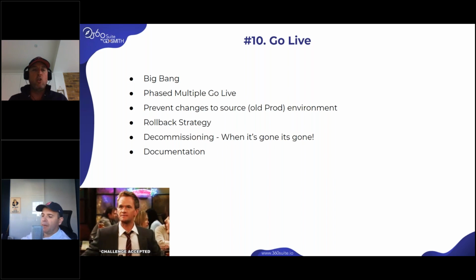Now, we all hope that everything will go perfectly. Sometimes it doesn't. Do you have a rollback strategy? If you go live and after 1 minute it fails, it's easy. You just use the old one. But let's say it takes 3, 4, 5, 6 hours, and you have a meeting and somebody says, all right, is it go or no go now? Somebody says, no, we need to roll back. Now, you have hours of people who have created stuff on the new environment. Is it strategic or not? Have you missed instances? What about the old instances? Were they on pause or not? So have a strategy for rollback.